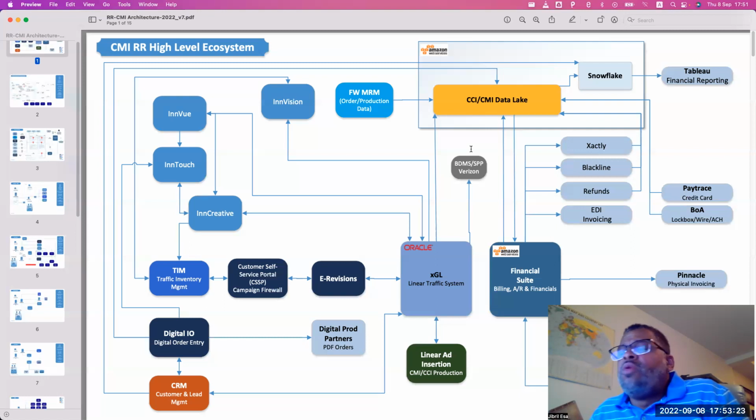But what we've started doing now is even to say, hey, we just can't be in that place and we have to deploy. We've started taking DIO and saying, okay, fine, we've got this project Roadrunner that it's competing against, and it's the local changes. We've put feature flags into DIO now to move forward and say, look, doesn't matter. We can deploy. We'll do our 2-week deployment. When you want us to turn it on, we'll turn it on.